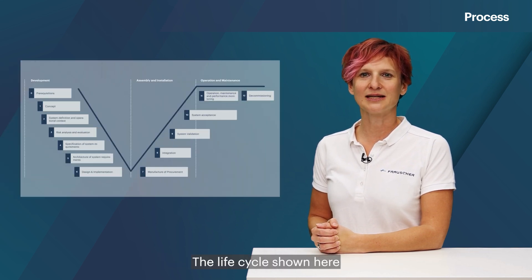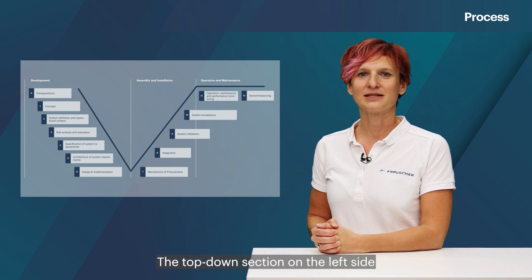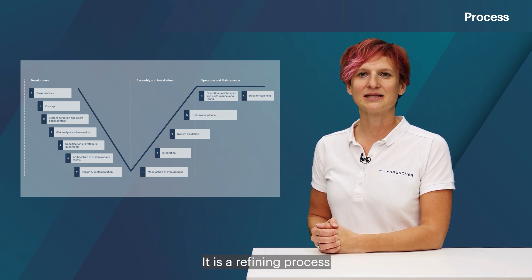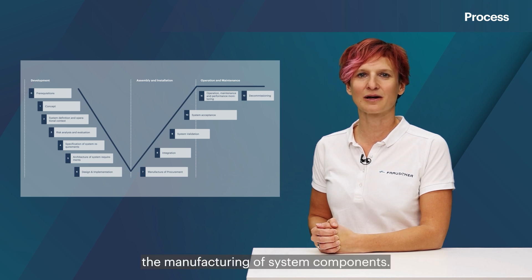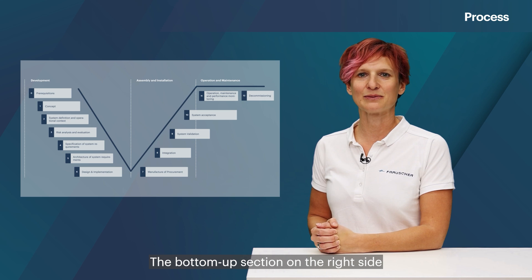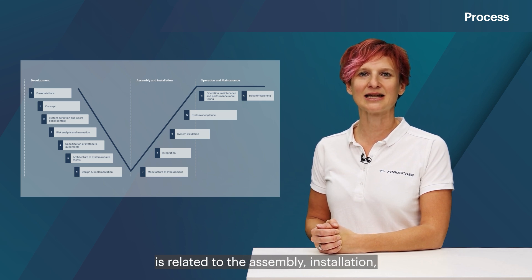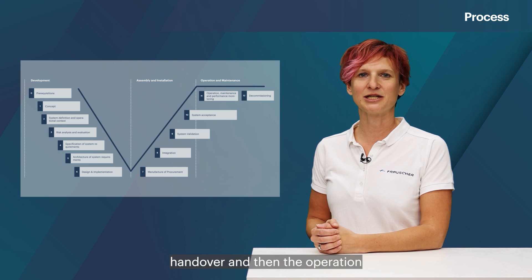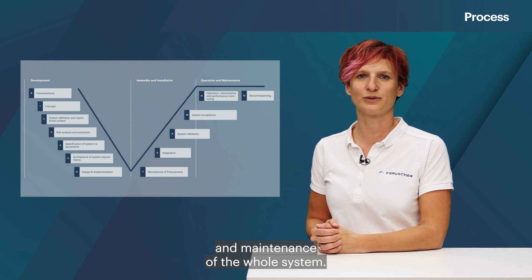The life cycle shown here has a V-shaped representation. The top-down section on the left side is generally called development — it is a refining process ending with the manufacturing of system components. The bottom-up section on the right side is related to the assembly, installation, handover and then the operation and maintenance of the whole system.